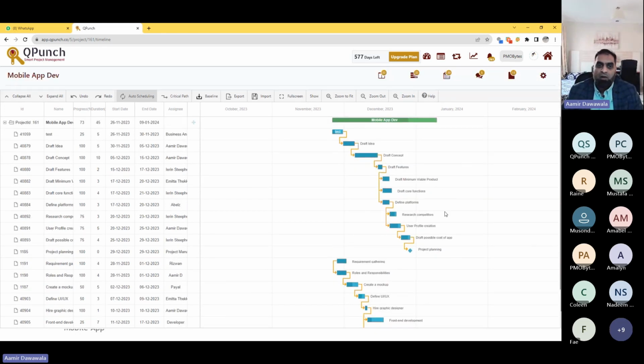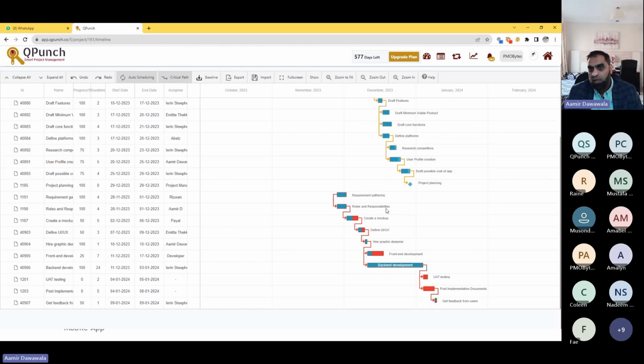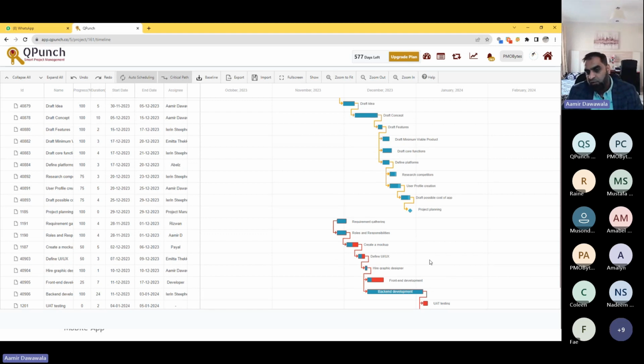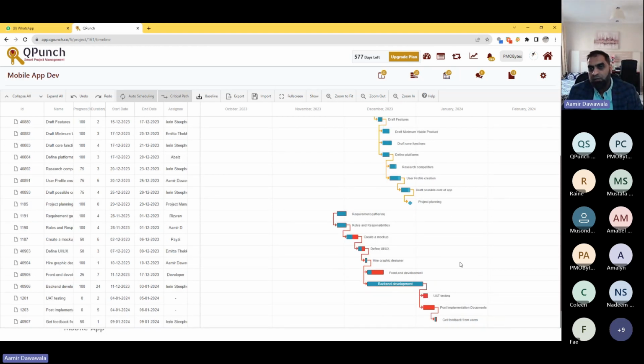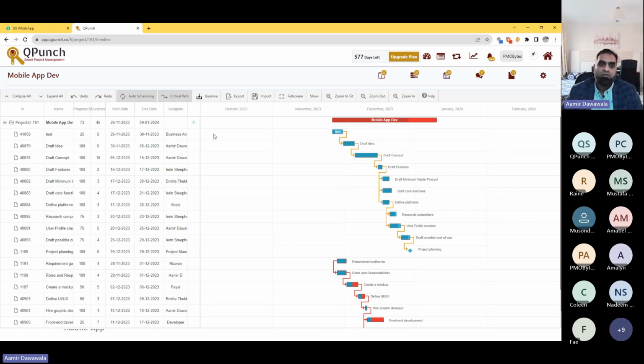That is the whole idea. Now I want to see what are the critical activities out of them. I click on critical. So these are the critical activities which will take more time. Both are running in parallel, but this will take more time to complete. That means I need to focus and none of them should slip. Because if a few of the others slip, at least I have some kind of a float, some kind of a buffer. I can still catch up and finish the whole initiative by mid of January. But if one of these activities pushes, that means my end January date is in danger. So this is where the critical path feature comes in. More features are there, but given the time shortage I will not go into everything, but this is the concept. Like I said, if anyone requires more information, they can come back to us.